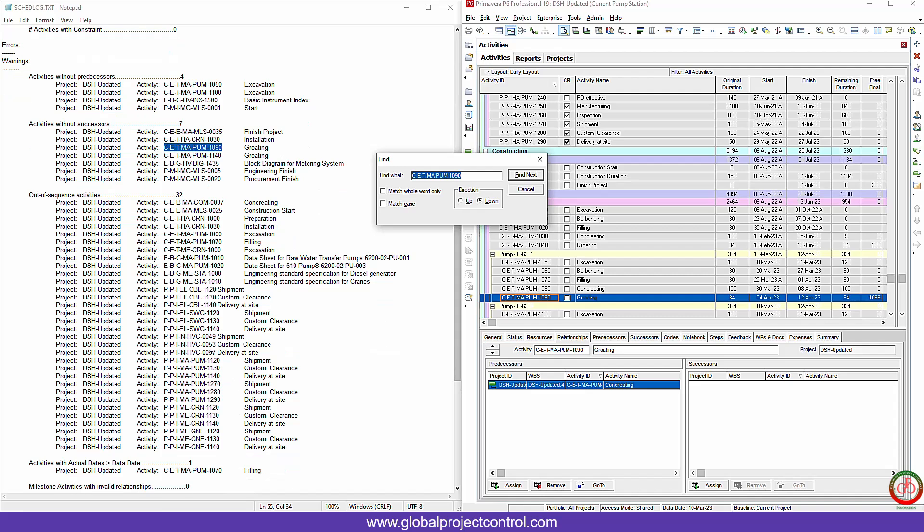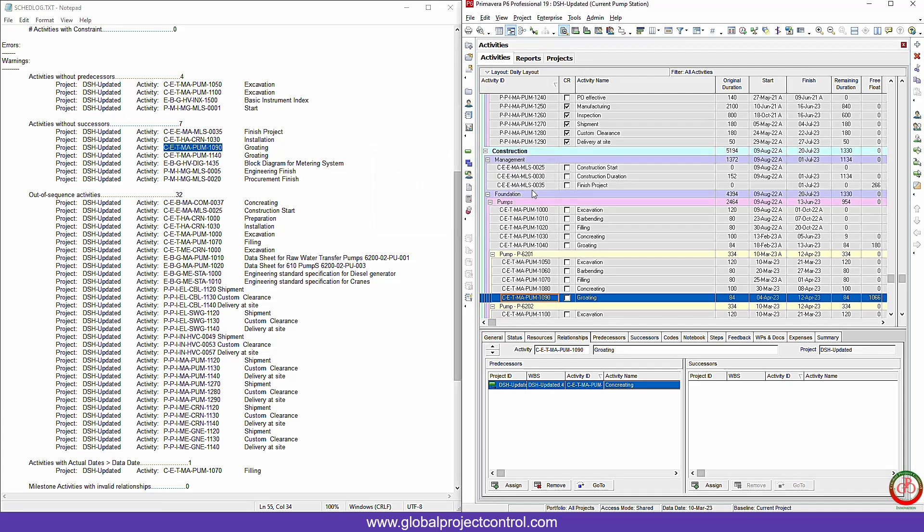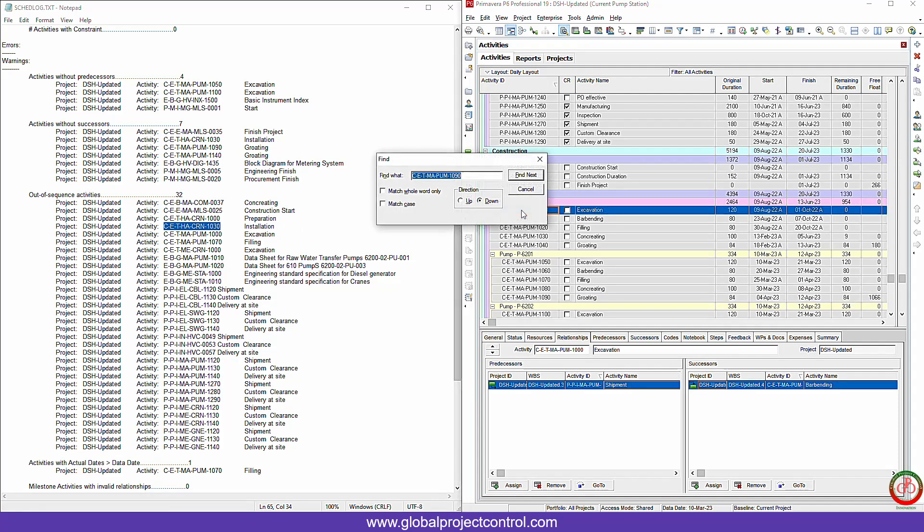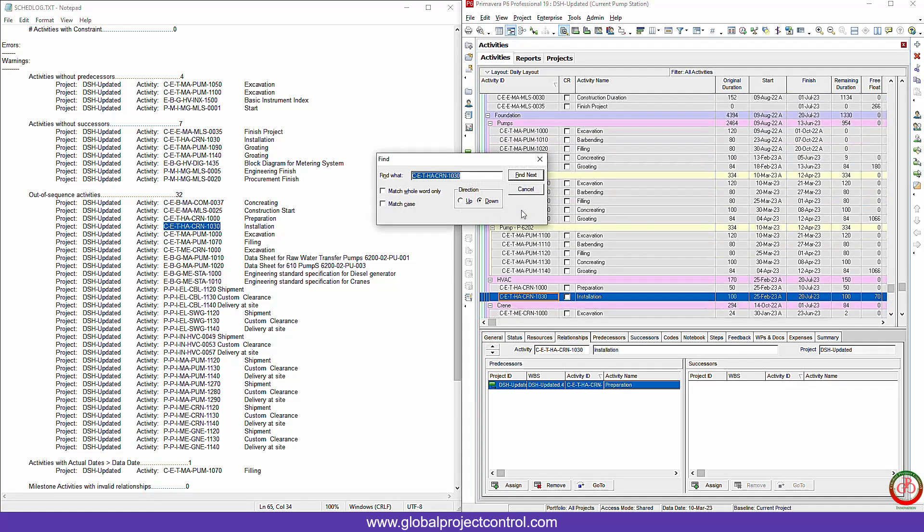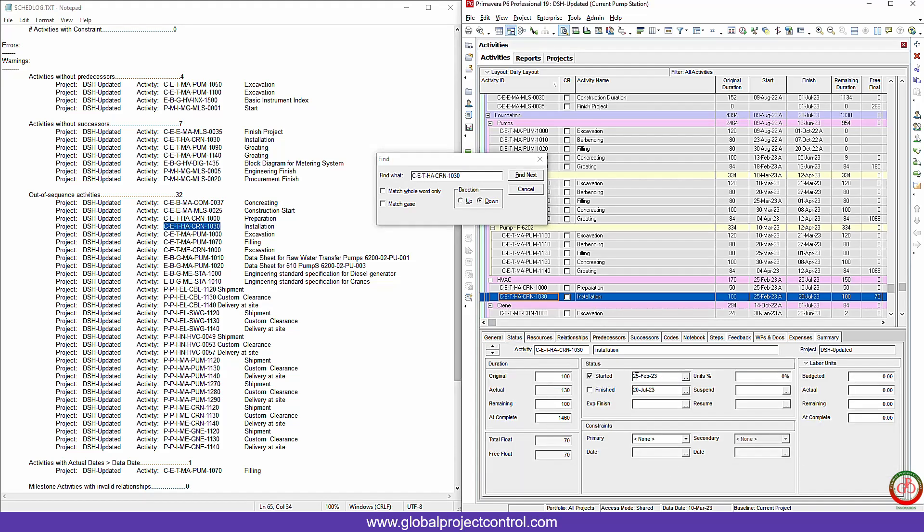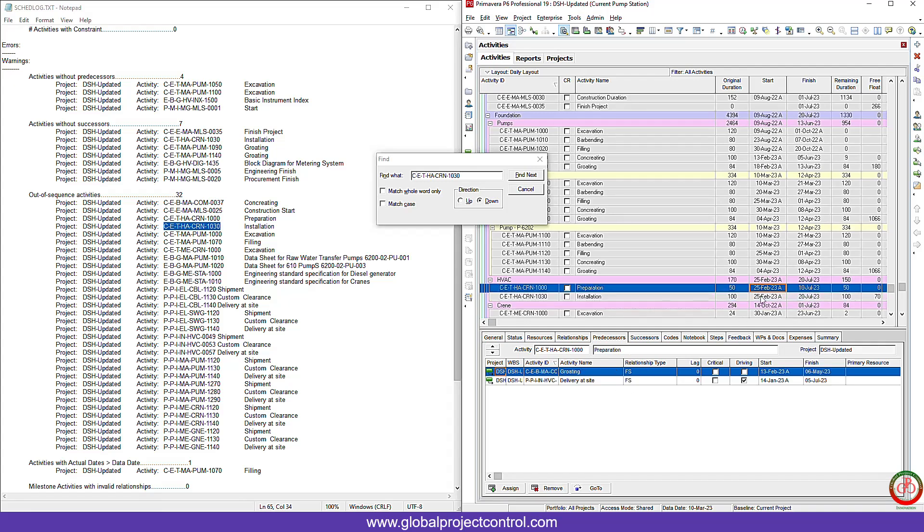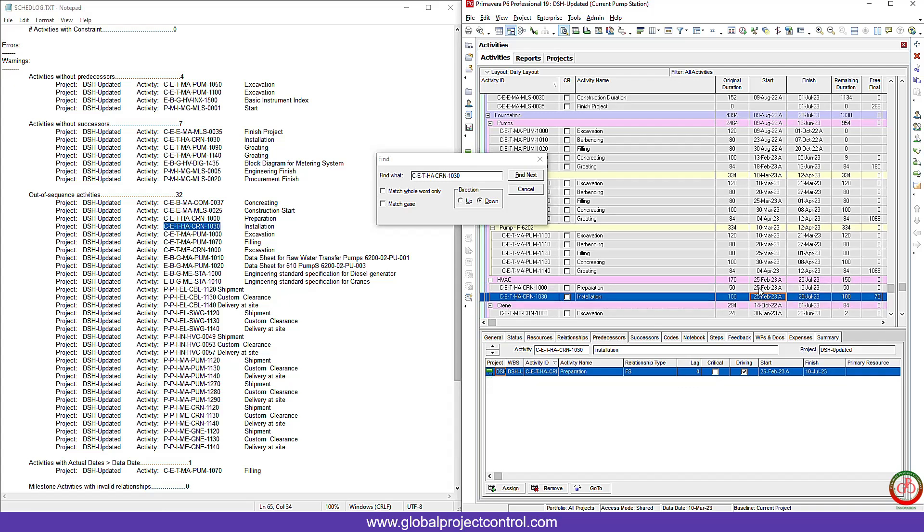Very useful information is the comparison: the current schedule logic with the baseline. If you want to compare it, you will see that this out of sequence activity provides the information. These are the changes. What kind of change? Over here, for instance, I copied it. Control F, paste the information and find it. Okay, here I started the installation on the 25th of February. If I go to the predecessor tab, you will see that I have the connection with finish to start with the preparation. Preparation is also started on the February 25th. But the relationship between these two activities are finish to start. But right now both of them are going to be started simultaneously.